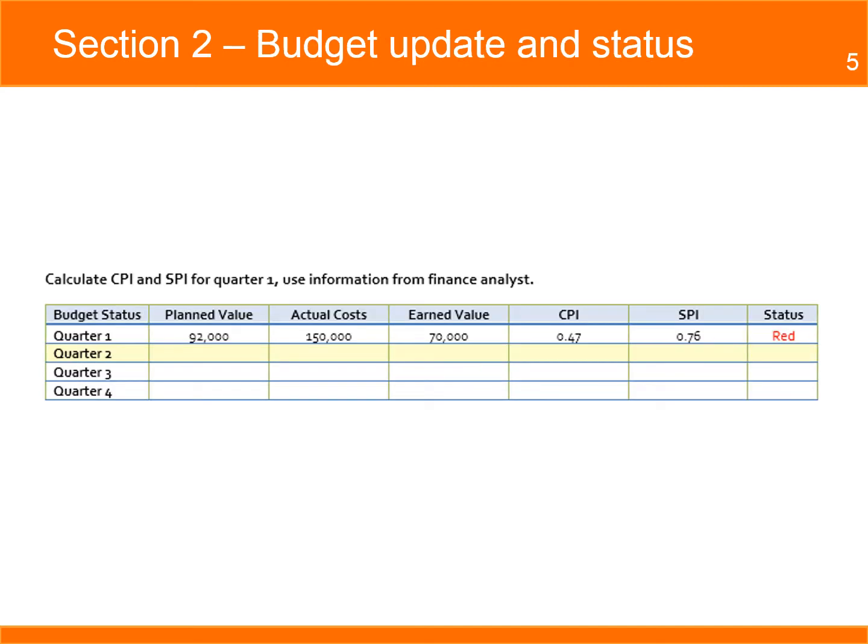Section 1 also contains information on the budget performance using earned value analysis: the planned value, the actual cost to date, the earned value to date, and the cost performance index and schedule performance index.